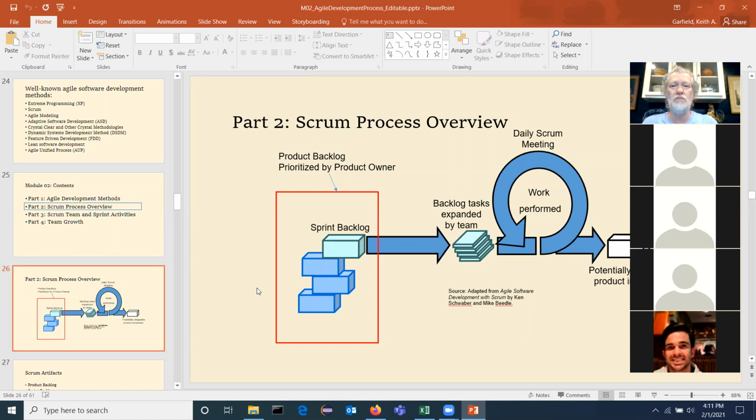At the end, you have to look back at the last 2 weeks and say, okay, what worked and what didn't. You assess where the backlog is, and the things that aren't done get thrown back into the hopper of the product backlog. And you're going to do a sprint retrospective where you're talking, okay, what worked, what didn't, what do we need to do differently? That kind of thing.